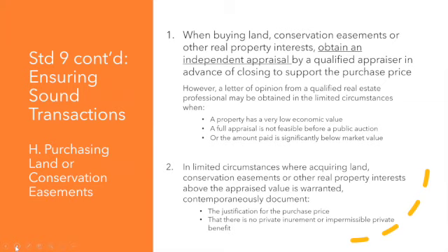Okay, so in the case of projects where the organization is buying the property, the standards and practices require that we establish the fair market value of the property in order to help set the purchase price. And so this is where getting an independent appraisal ourselves comes into play. An independent appraisal really means that the appraisal is prepared specifically for us as land trusts, as a potential buyer, and the appraisal would state that.